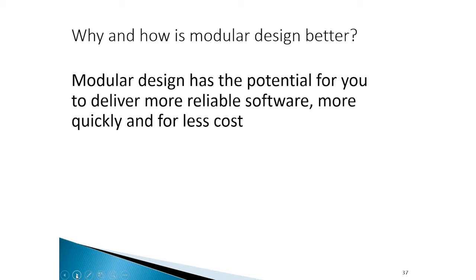If we figure out what problem we need to solve first, then that helps us prioritize which modules we work on first. That helps you put together a plan of prioritization. And what that will mean is that instead of waiting until the entire system is finished, you're able to start delivering software that works for your users better.